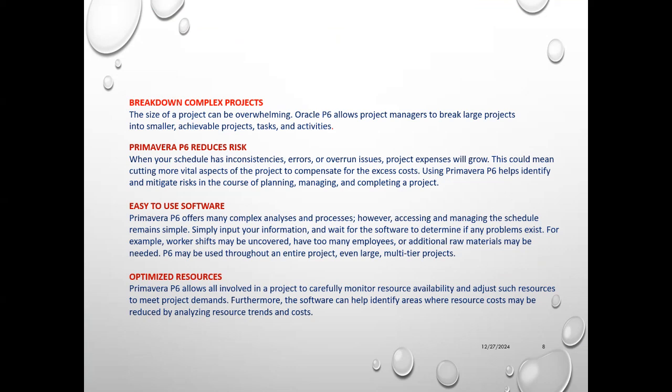And resources, we talk about the resource. For example, you create your project schedule, a baseline schedule. Now you are doing the iteration. I create the initial draft, then I check it with my department head, the project managers, or the construction managers, and they have some suggestions, because we need to check the logic, the access, the egress, the procurement. Let's see what if my procurement gets delayed, then what is going to happen. You do all the what-if scenarios. Then after that you come to a schedule.